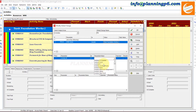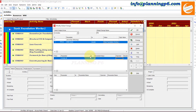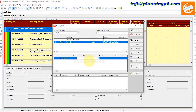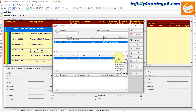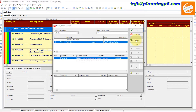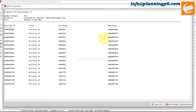In the custom option, you can enter text for the new value. For example, you might enter a prefix like 'EPC-P6' or 'CON'. You can also add another activity parameter, such as Activity ID, and combine them. After clicking Change, you can see the log showing the old activity ID value and the new activity ID value.